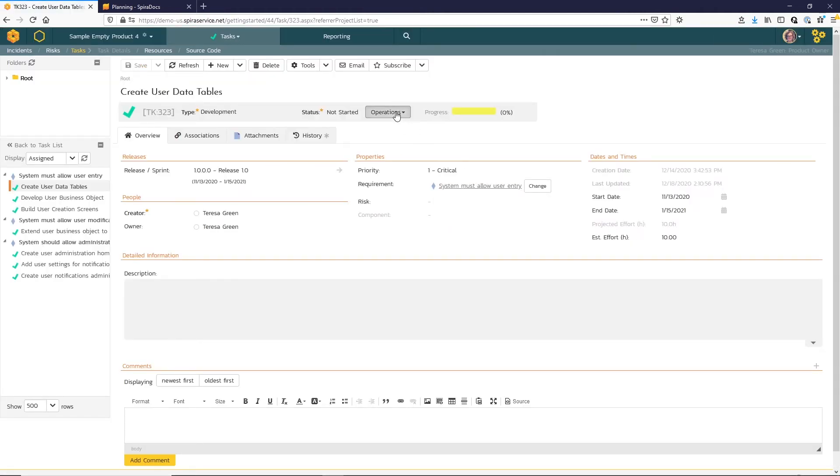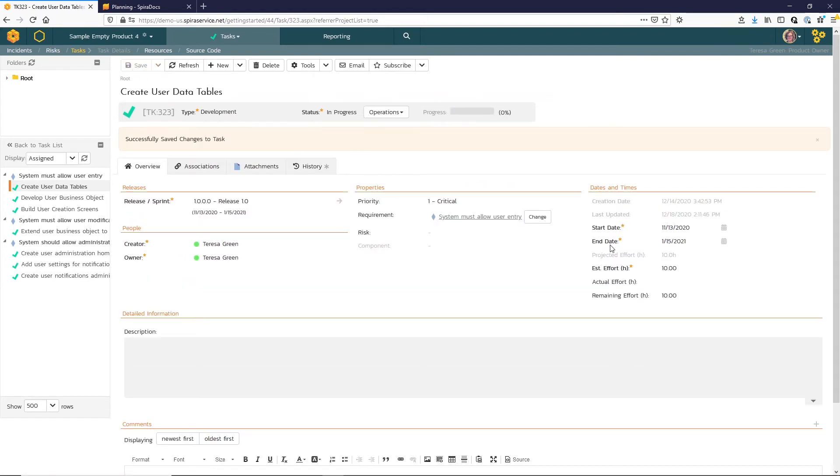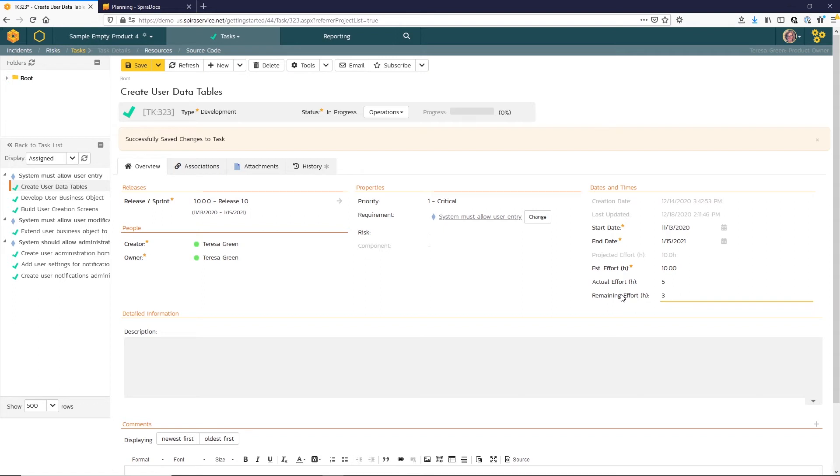Now I want to go ahead and start that task, hit save, and perhaps enter in some actual effort for the task. I can enter an estimate for the remaining effort as well. I can save those values.